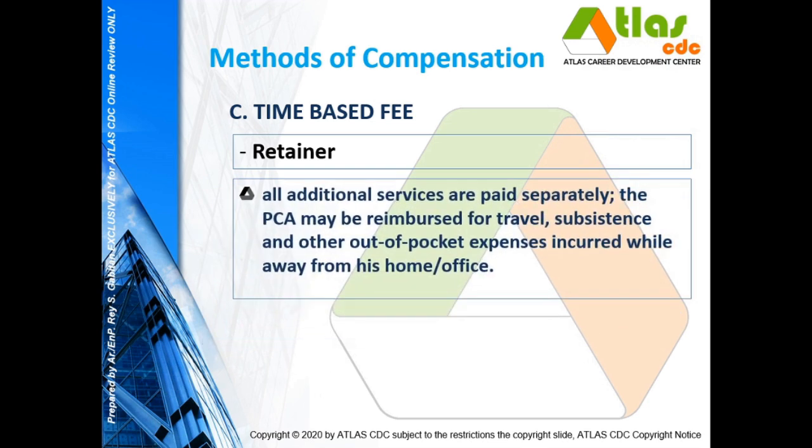All additional services are to be paid separately. So the reimbursable expenses for travel, subsistence, and other out-of-pocket expenses incurred while away from the office should also be paid separately by the owner, not included in the retainer's fee, no?